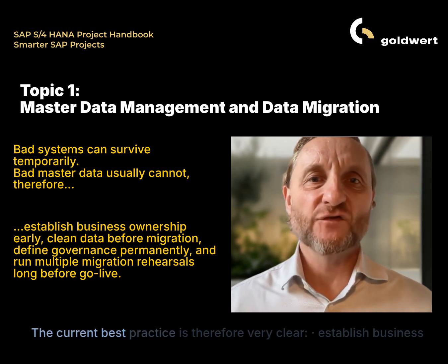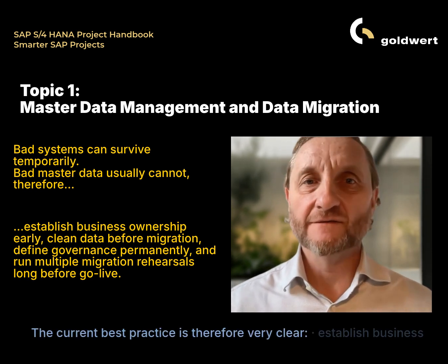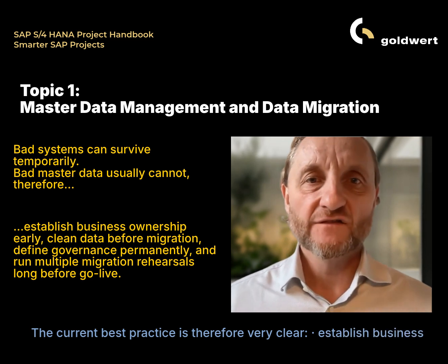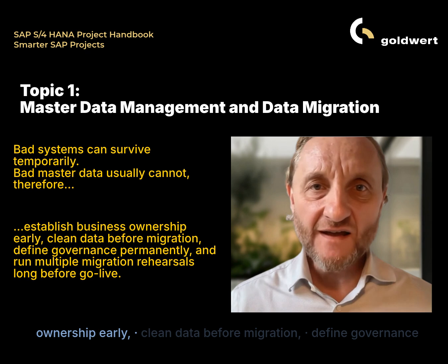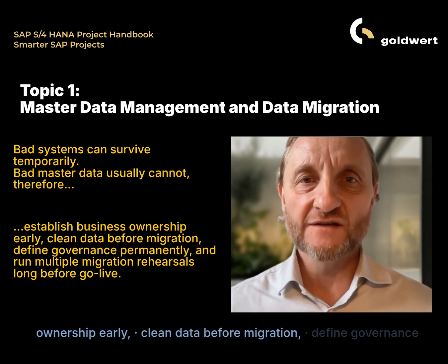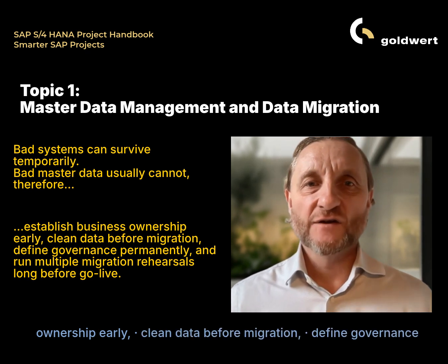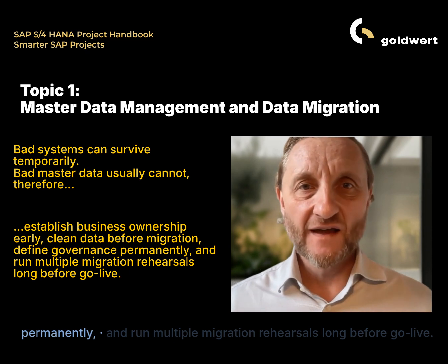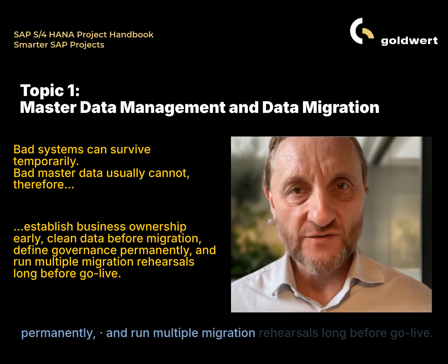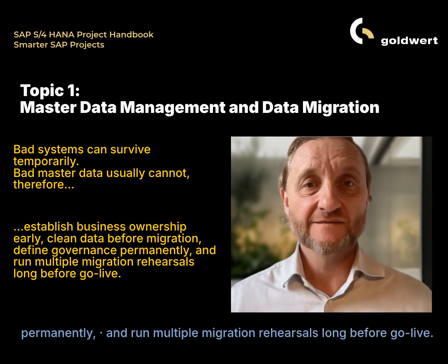The current best practice is therefore very clear. Establish business ownership early. Clean data before migration. Define governance permanently. And run multiple migration rehearsals long before go-live.